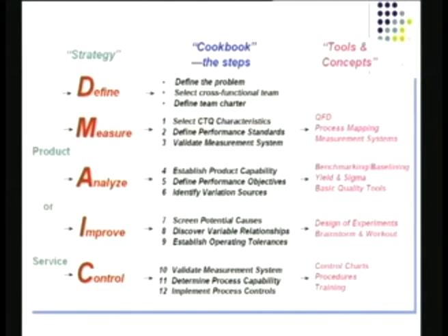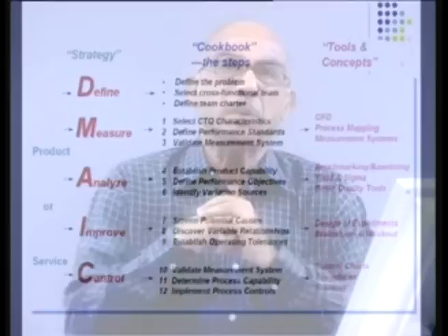I cannot tell you how important this third point is under measurement. Many times what happens when we measure quality, our measurement system is not good enough to be able to tell between good and bad. It can be as bad as that. And this is something that has to be checked before you get into a Six Sigma project. So please make sure you do gauge R&R studies. If there are some measurements involved, you do gauge R&R studies.